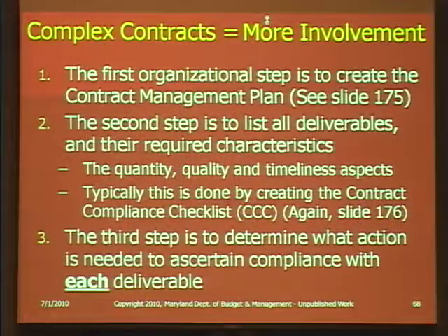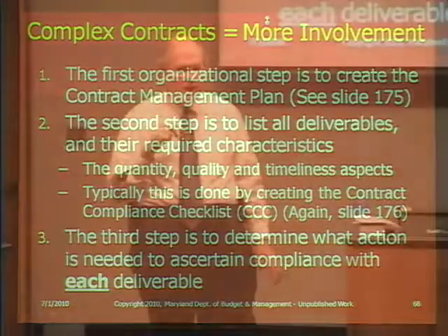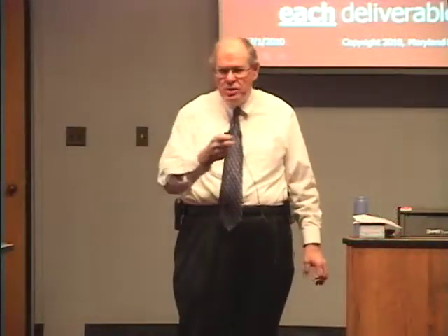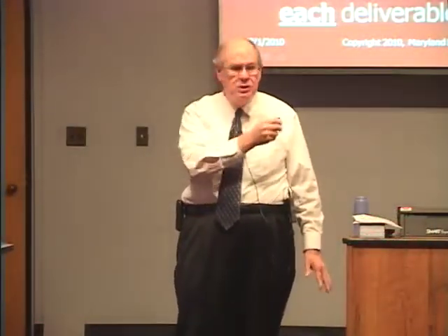The third step, and we're going to take a little bit of time on this, is to determine what action is needed to ascertain compliance with each deliverable. Actions that typically need to be built in at the solicitation stage in advance.